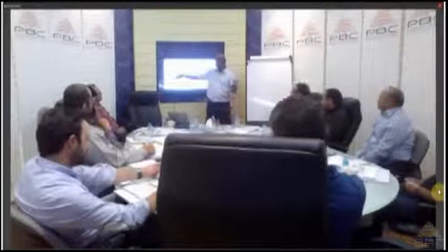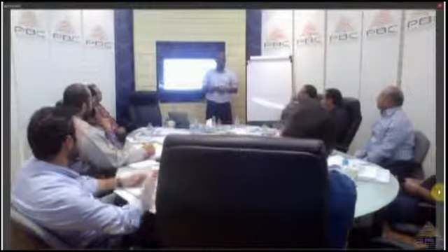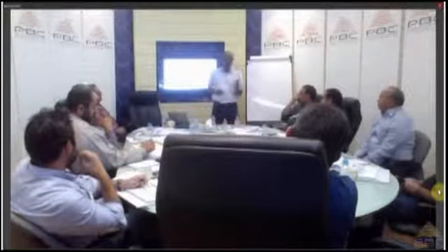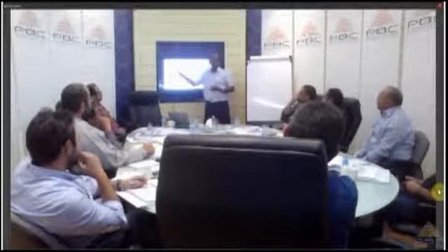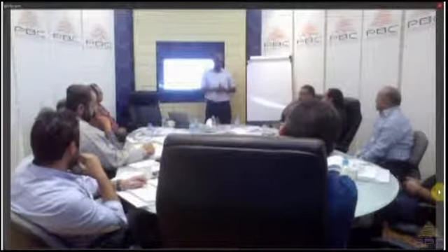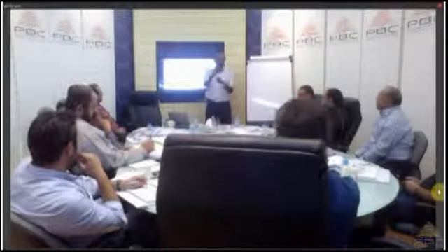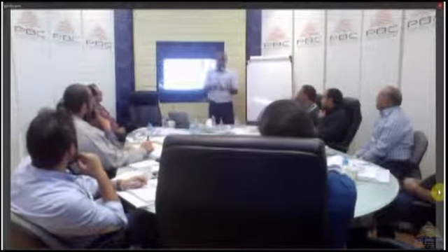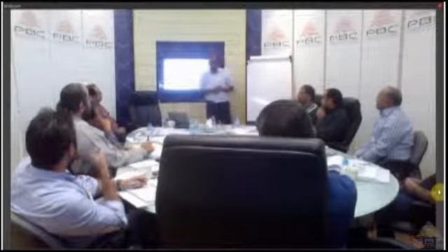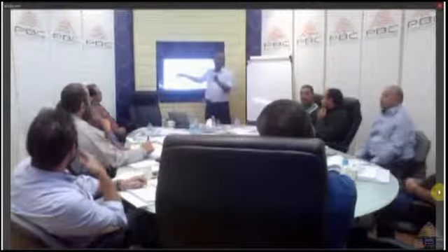But you mentioned something about prevention. So we said QA is all about prevention. So spending money when? Before the problem happens, in order to avoid it. We call that cost of prevention. Now, sometimes you spend money during the process. That's why we call that appraisal. For example, the presence of a site engineer.